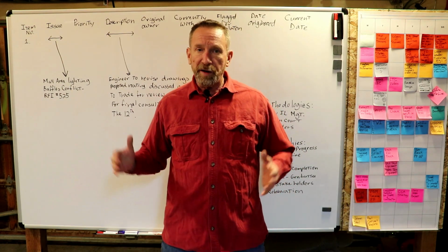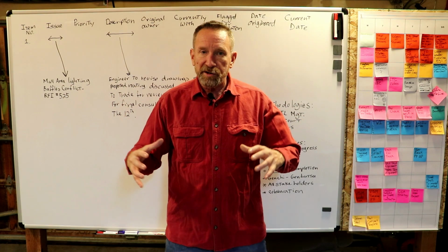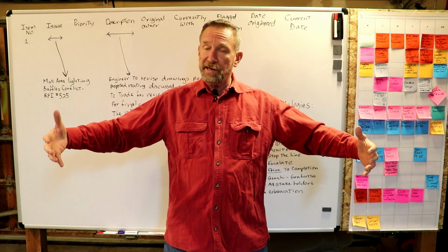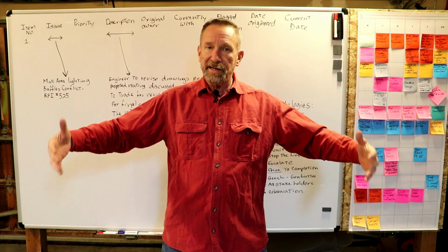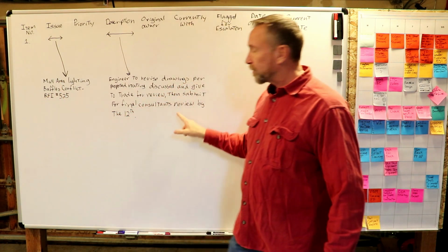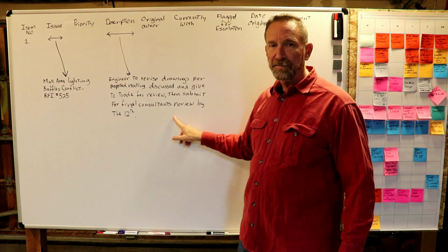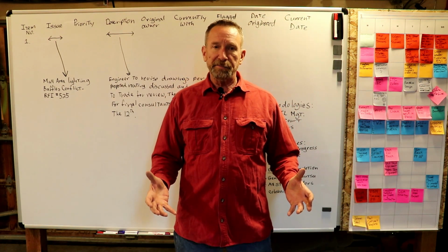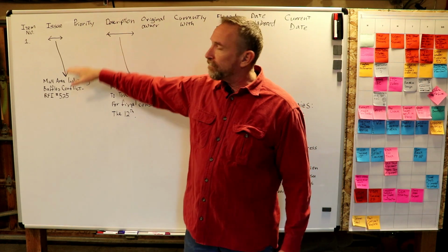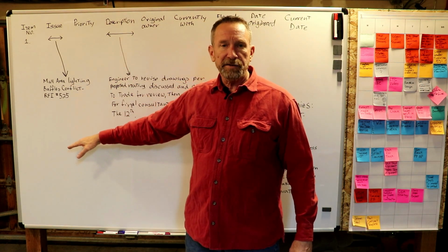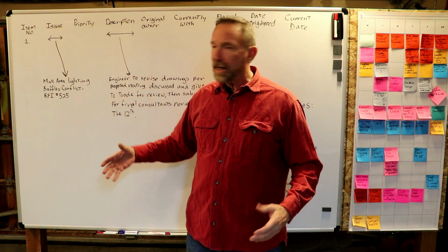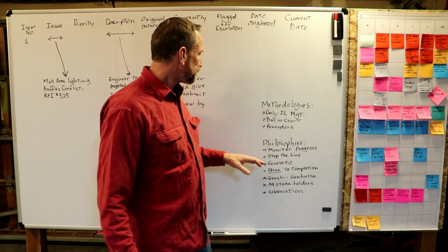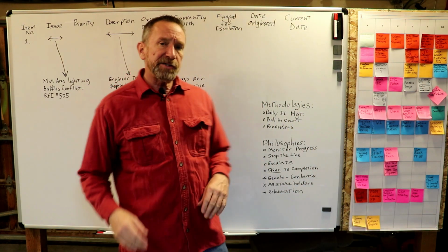They keep it moving. All senior management works with them, and we meet as a team at least once a week and more if necessary. We meet as often as is necessary to make sure this functions correctly. Now, it usually ends up over a period of time coming down to once a week, right? Because you only have 4, 5, 6 open items at any given time. And that's on big jobs. Very few items are open if you're always getting each one of them done. Okay? And then reminders are key.